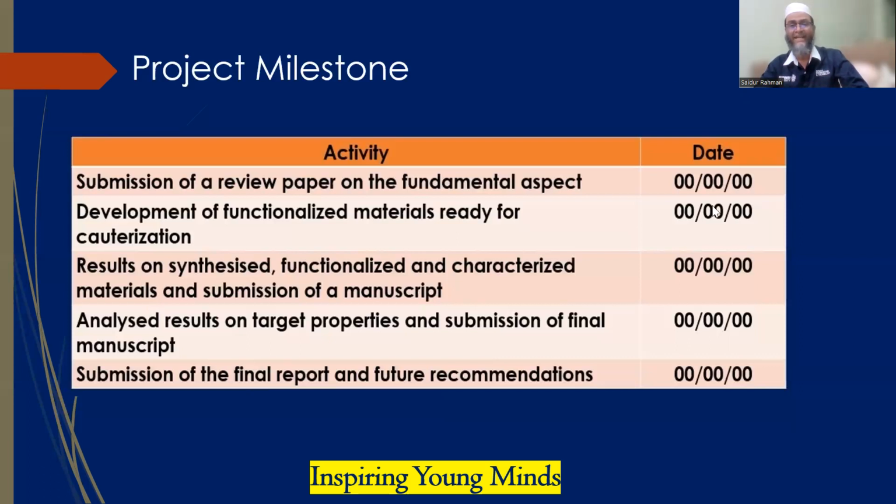Okay, so you mentioned specific date. Let's say 10th of April, we'll submit a review paper. Okay, on 13th of August, we'll develop functionalized materials ready for characterization, for example. Okay, and results of synthesized results. So you got some good results. That is giving an indication that cost of synthesis is low. Okay, compared to the literature, cost is 50% low, or scalable synthesis has been done up to certain level. That is called milestone. These are important things needed in some proposals.